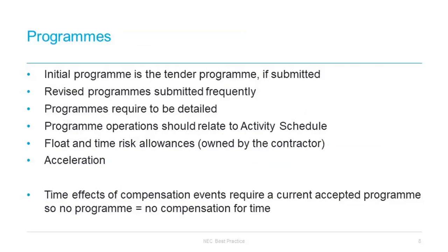The programme, or lack thereof, is another common issue in NEC contracts. Firstly, it should be noted that there is a difference in the programme between the contractor's contract starting date and the contractor's access date. There might be quite a lot of activities that are required before the physical works start on site. You cannot start work until the access date, but that could be some time after the starting date.